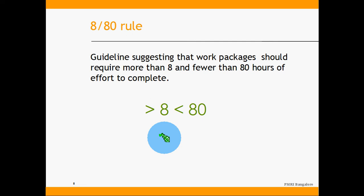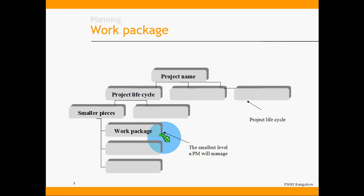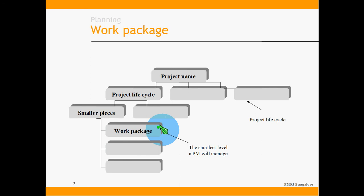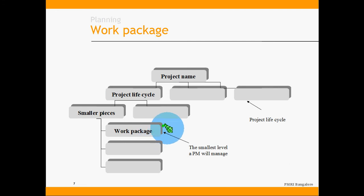Whenever you do a WBS, you will be in a dilemma about to what extent to decompose work packages. If you decompose to the most granular level, the lowest level can become activities, which is an overkill. PMI has given a guideline — a global best practice — that when you decompose a project into a WBS, work packages should be between 8 hours and 80 hours of work. For a very small project, work packages might be around 8 to 12 hours; for a very large project, they could be 70 to 80 hours.